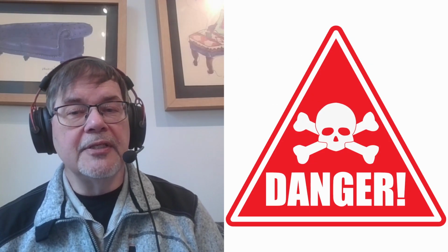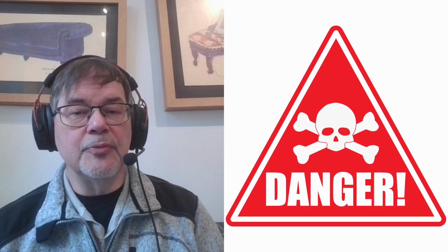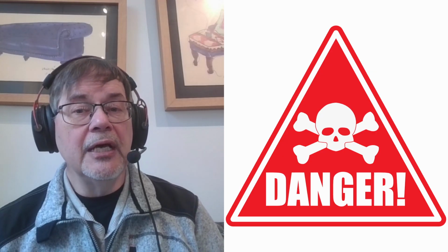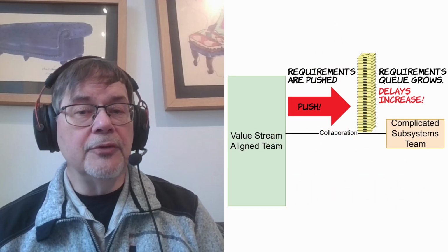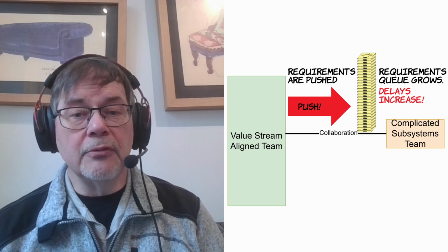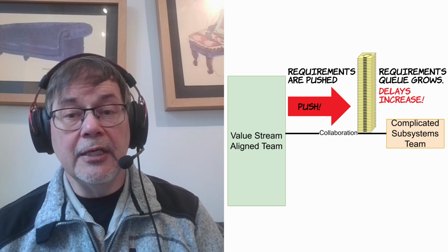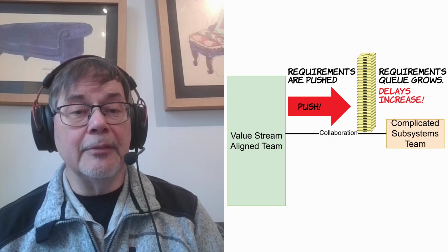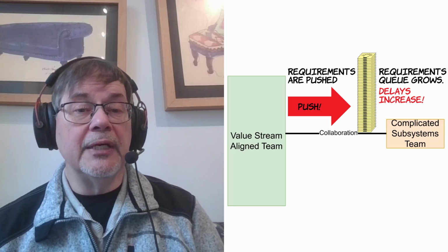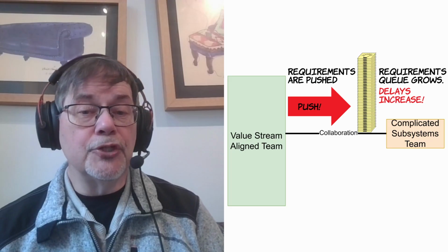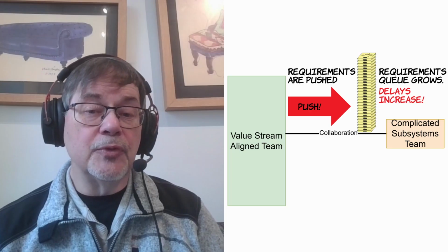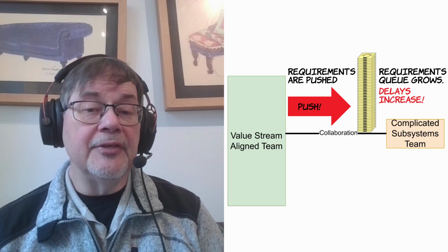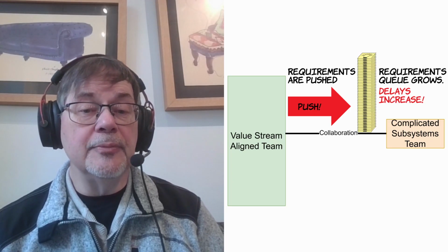Also, the book skips the design of the development process the teams will execute, and this is a fatal omission unless you have this knowledge from some other source. For example, if you create a team organization that is great in theory and then implement a push process or fail to implement a pull process correctly, the team organization will not help. This example shows a situation where we have a good team structure, but we used a push process instead of a pull process, and push processes have no mechanism to balance the workload between the teams, and this means queues of work will build up between the teams.